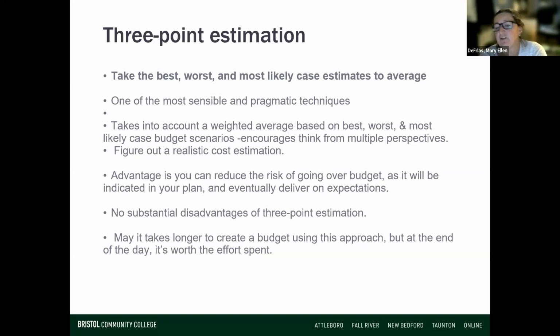The advantage is it does reduce your risk because you've already taken into account the worst case scenario, right? So you've already figured out how much the most expensive thing is going to be. There really are no true disadvantages to this, except that you do have to create 3 different estimates: best case scenario, worst case scenario, and the most likely case, you know, if only one thing goes wrong, this is where we end up.